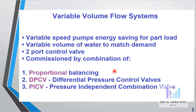We have variable volume of water to match demand. We can use two-port control valves commissioned by combination of proportional balancing and PICV, differential pressure control valves (DPCV), and pressure independent combination valves.